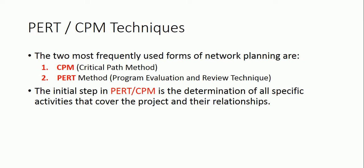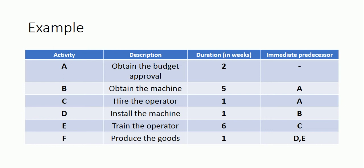Network analysis involves the determination of all the specific activities that cover the project and their relationships. For example, Activity A — obtain budget approval — takes two weeks with no immediate predecessor required. Activity B — obtain the machine — takes five weeks, and Activity A must be completed first. Activity C — hire the operator — requires one week, and Activity A must also be completed before it can begin.